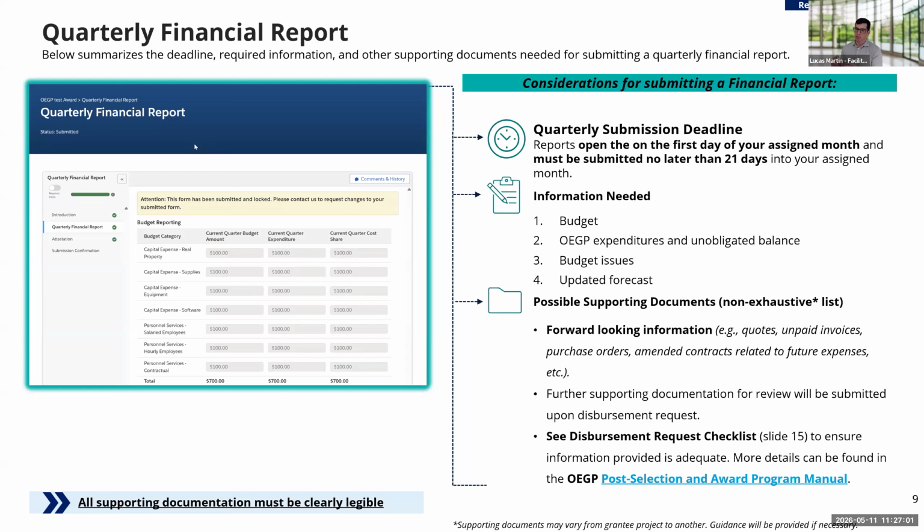in that we're intending for you all to submit potential quotes, unpaid invoices, purchase orders, and any amended contracts that might have been previously shared, so any updates to those that would help provide supporting documentation justifying future activities. This is just another venue for you to provide that type of documentation, and we will look to that to make sure we have a strong understanding and appreciation for future obligations for your awards and for the overall project.